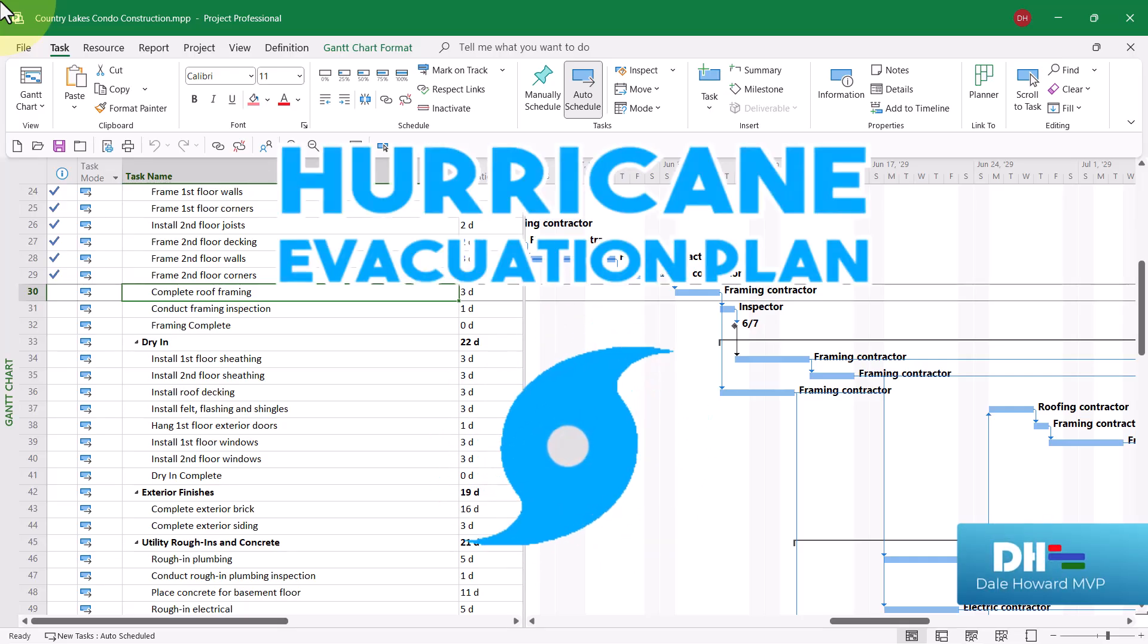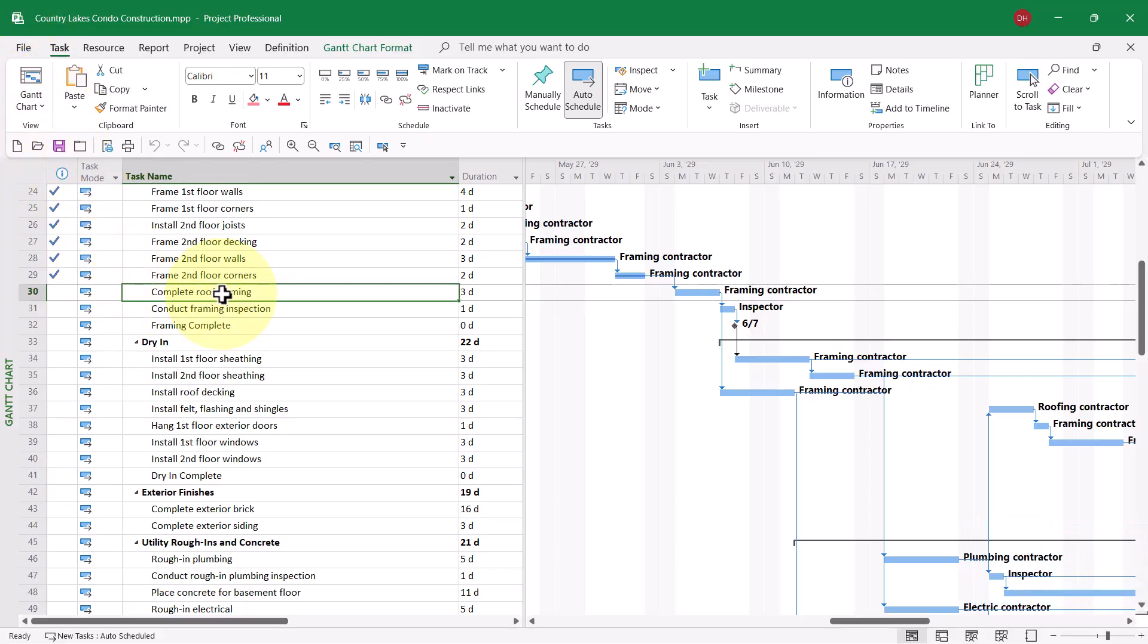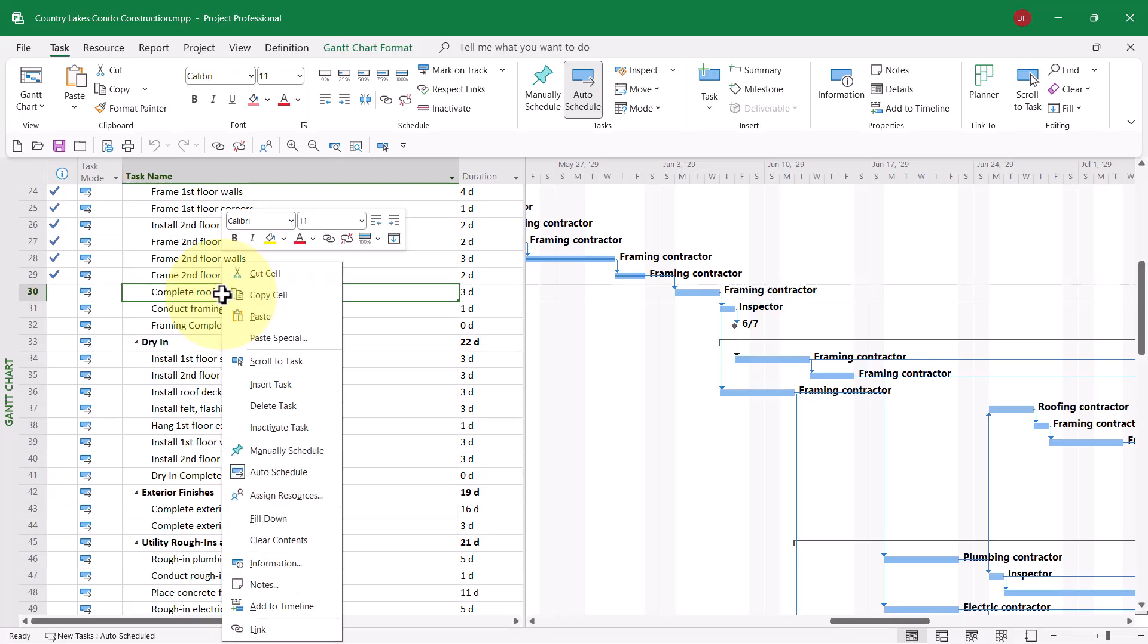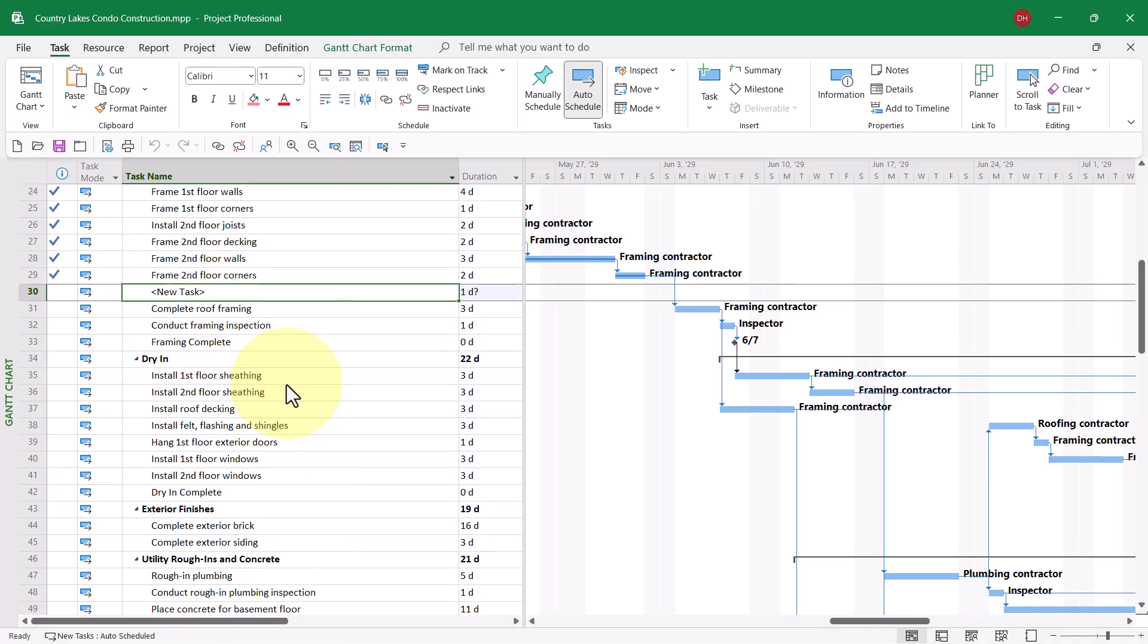Here is how I would approach this situation. I would select the first task that would be impacted by the hurricane delay. Then I'd right-mouse-click on that task and choose the Insert Task item on the shortcut menu. Then I'd give the new task a meaningful name, something like Hurricane Delay.